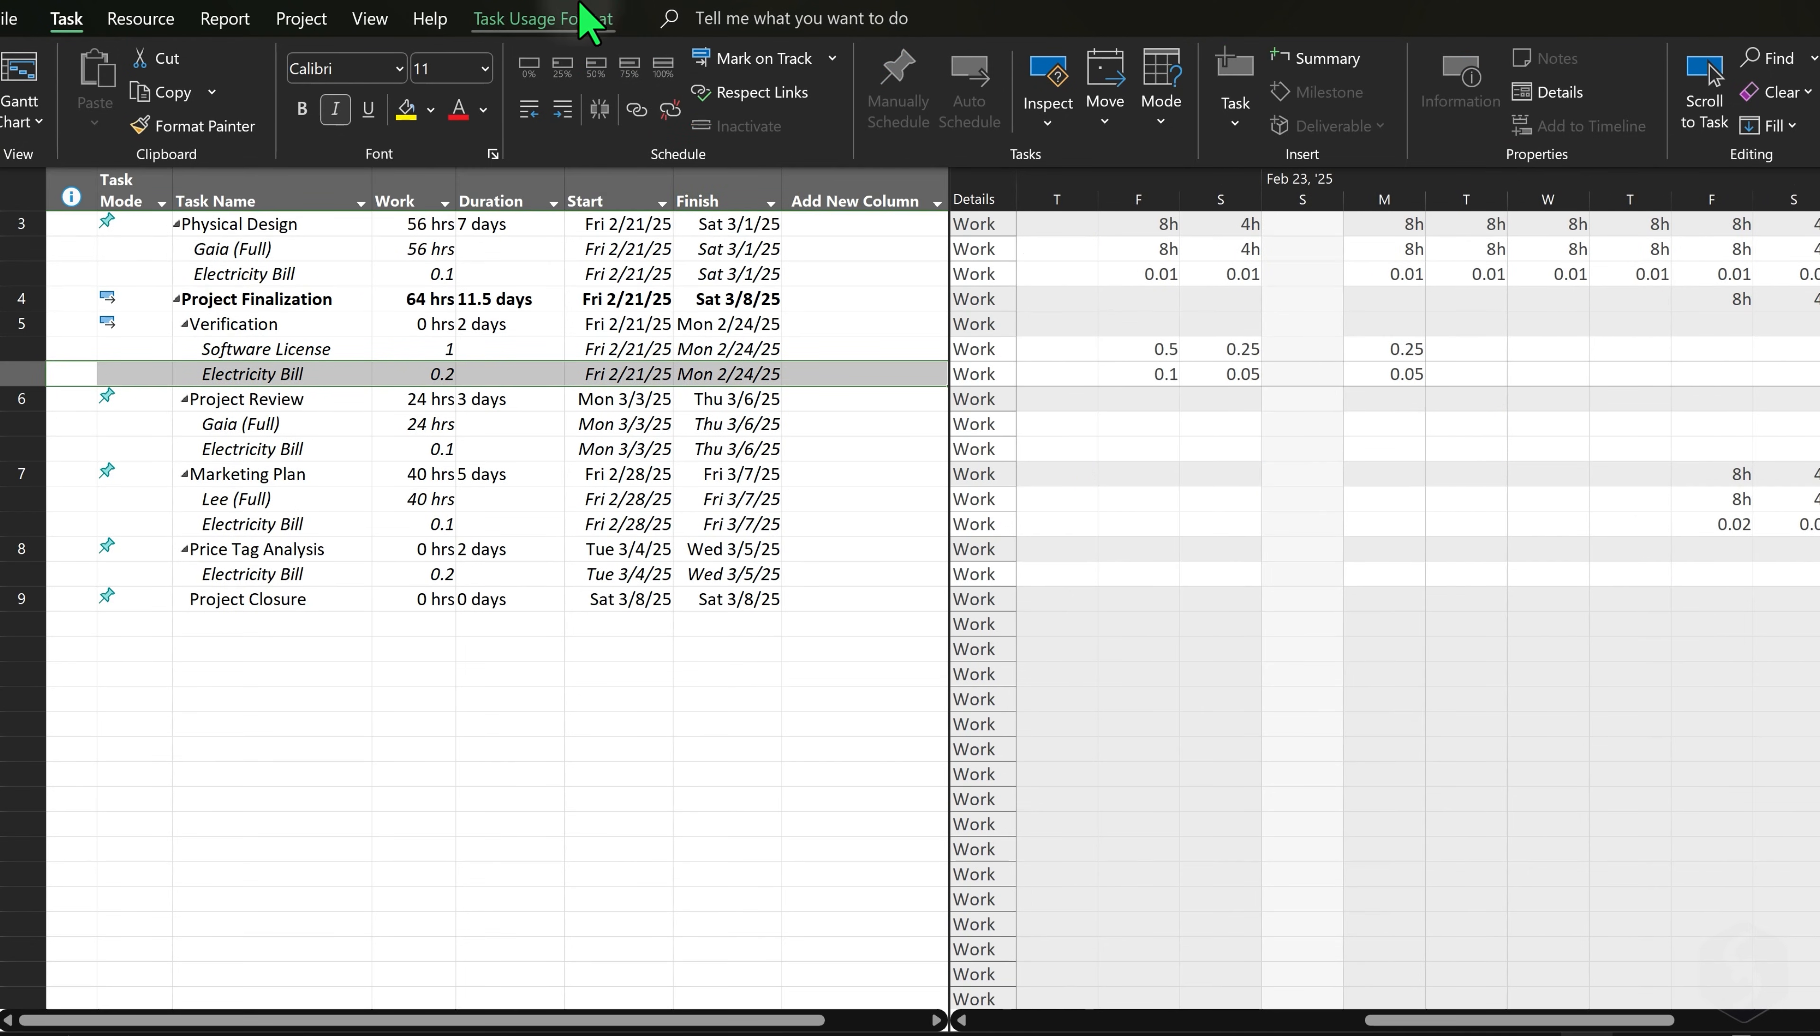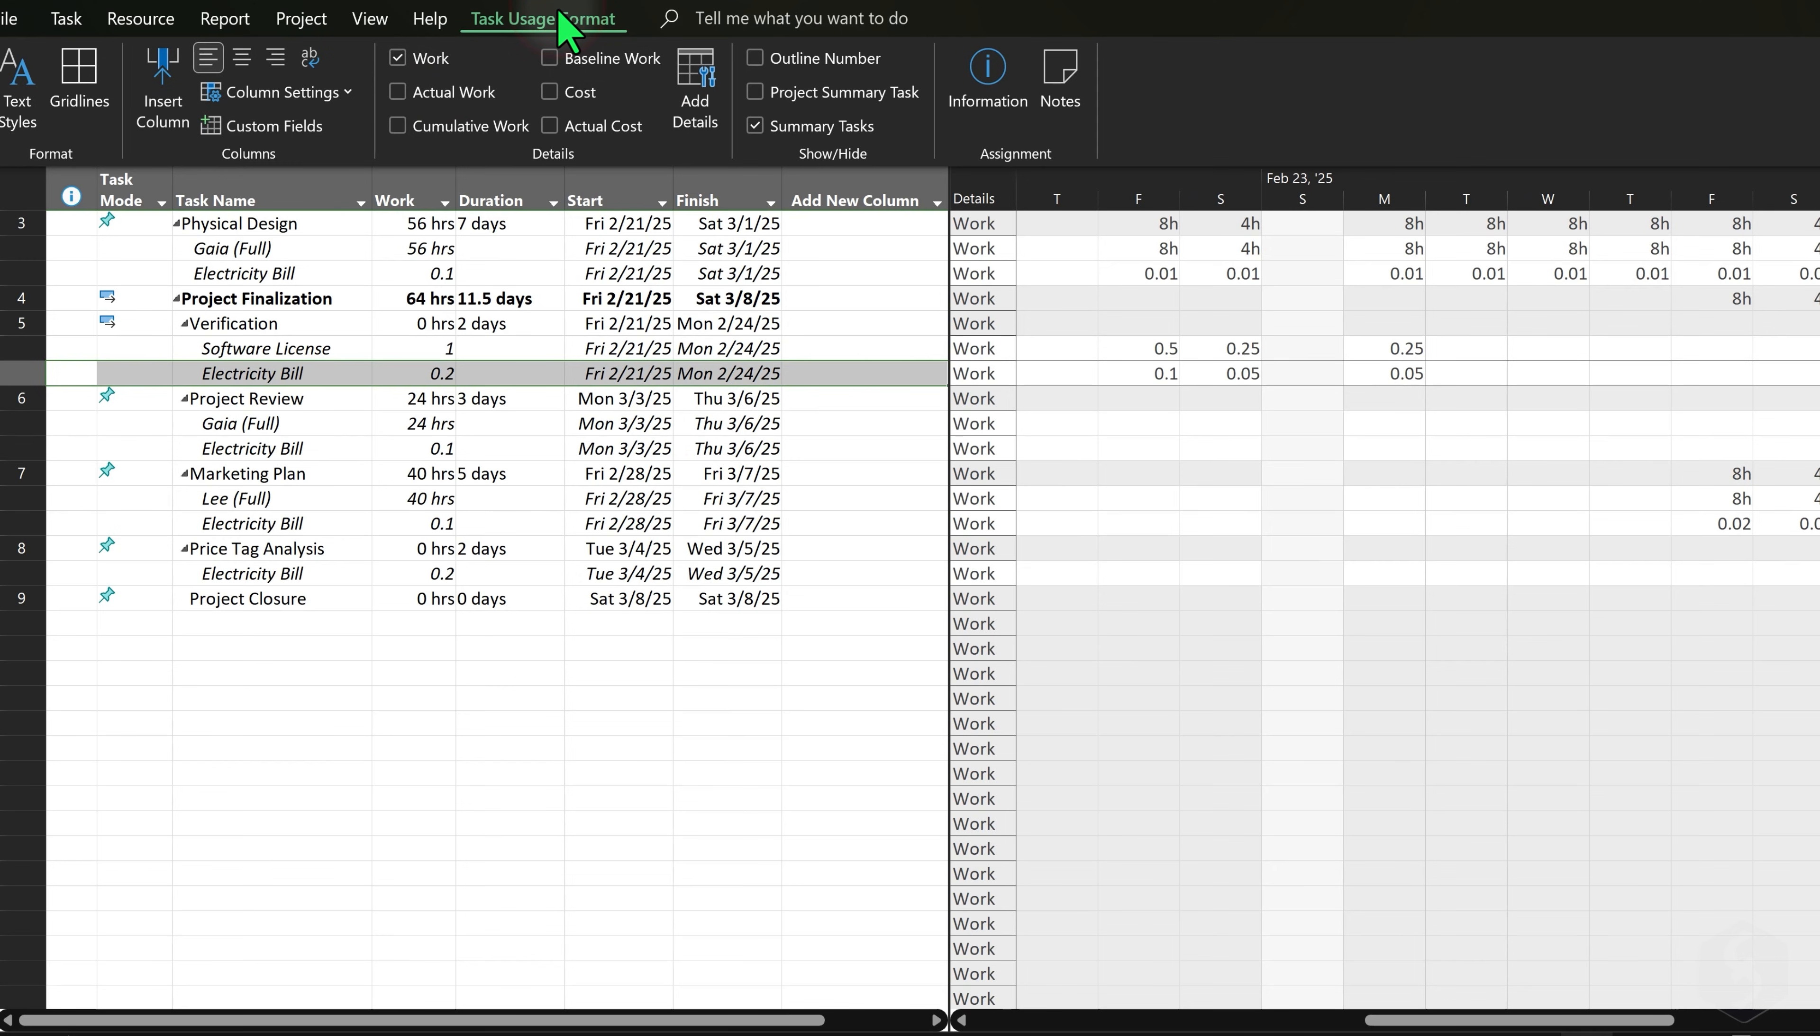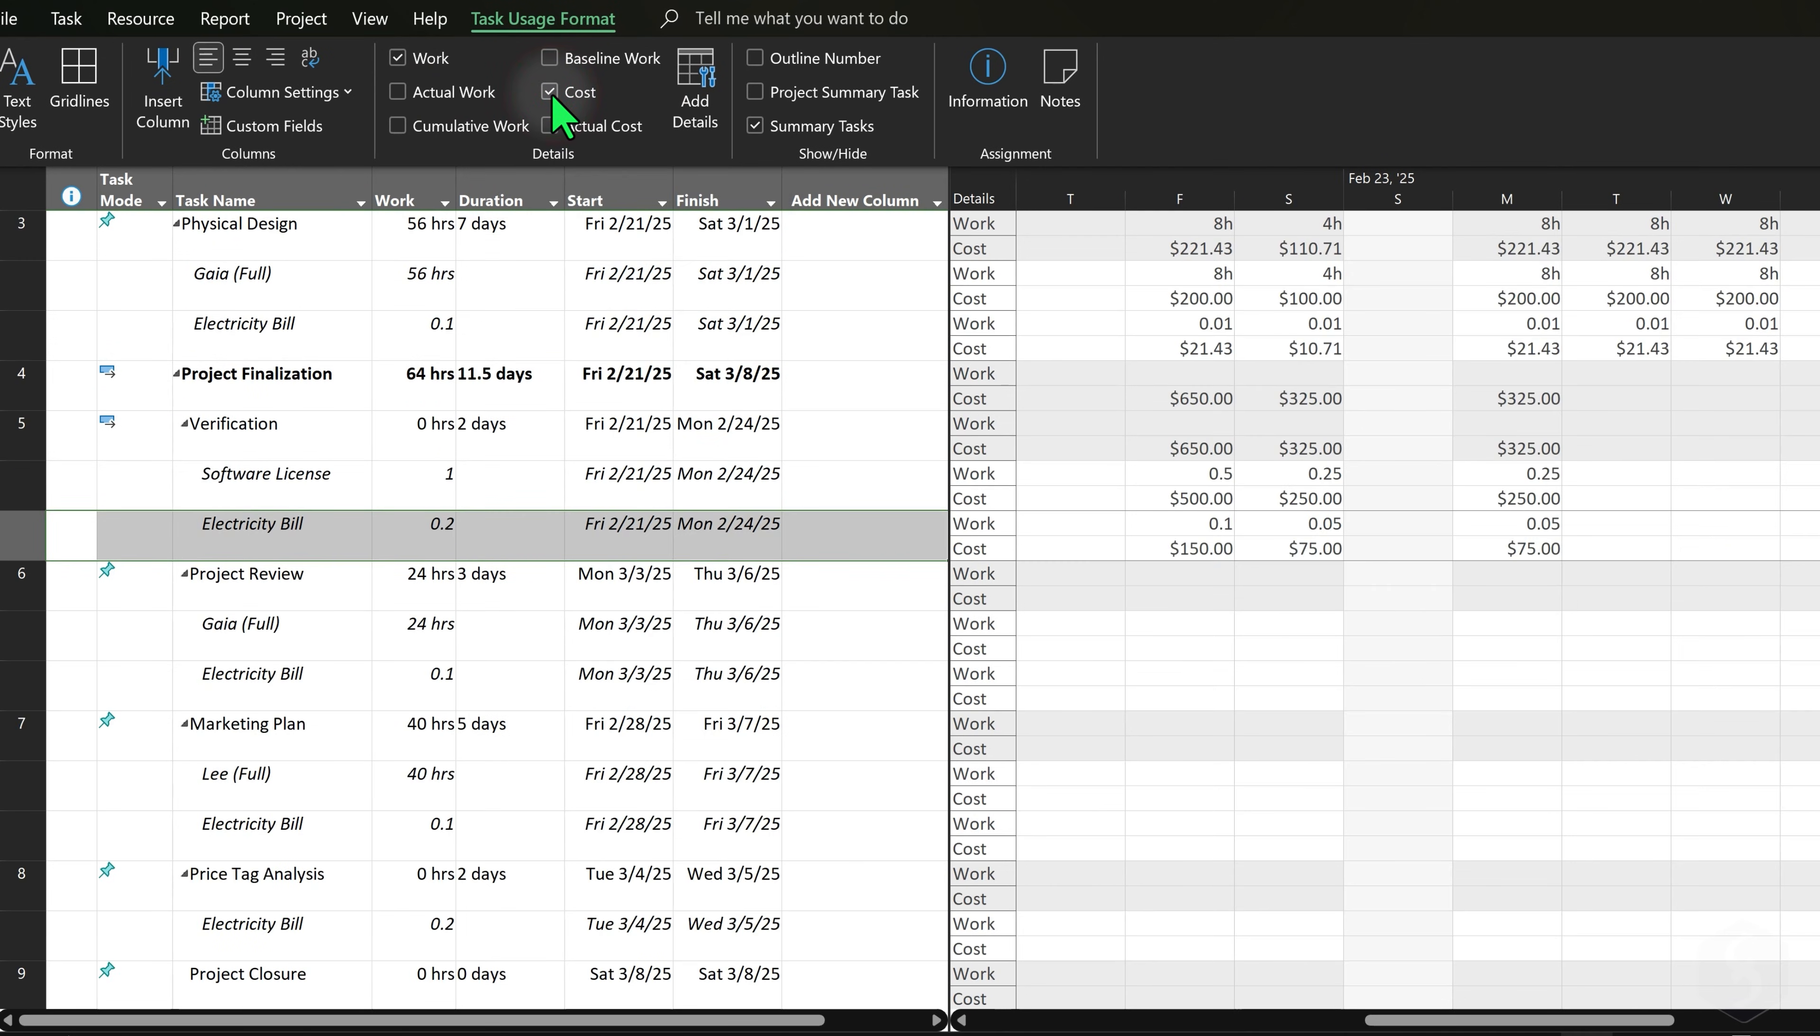At the top, go to Format to enable other rows, such as Cost, to see how your investment is spread in time.